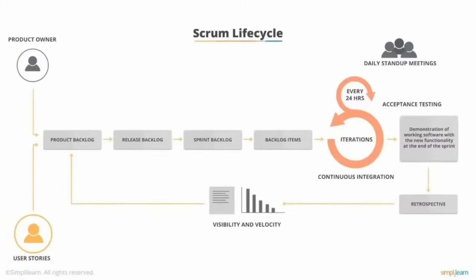In collaboration with the product owner, the team decides how to group the user stories into releases based on the product roadmap. Once the release planning has been completed, the user stories are then selected for a sprint. The duration of the sprint is going to be 2 to 4 weeks. Once the sprint backlog has been determined, the team then disaggregates each user story into tasks.